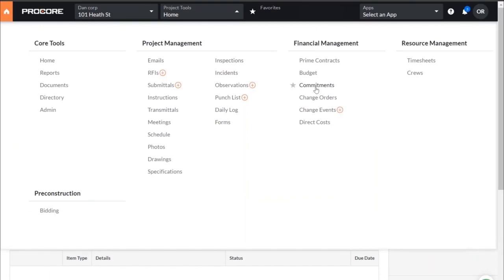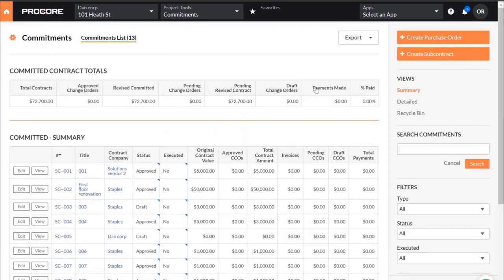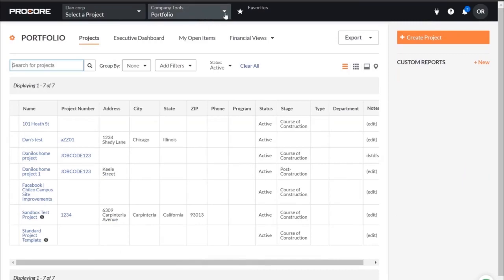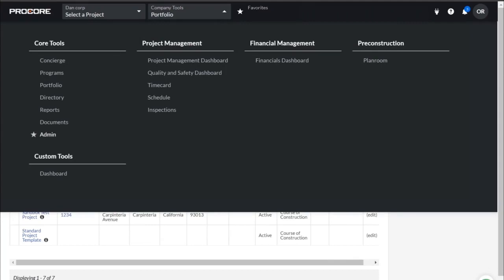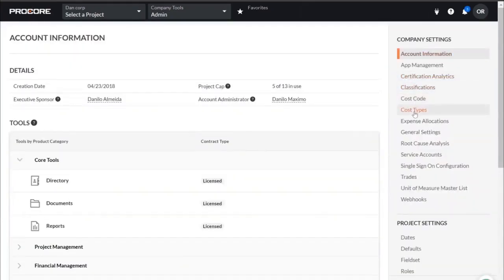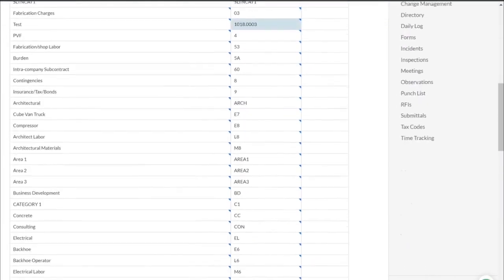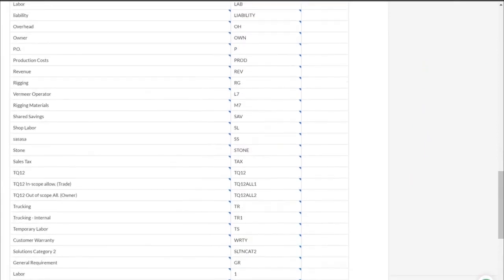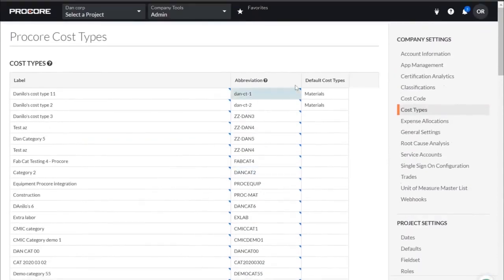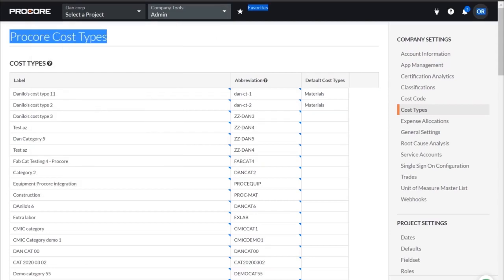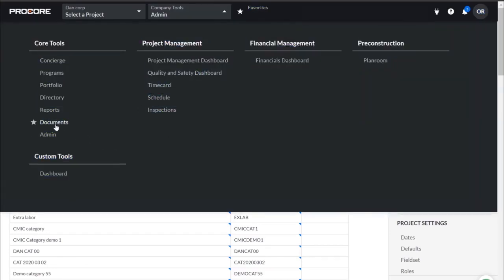I want to drill down into the Procore application and show what's happening from the subcontract perspective. Coming over to the admin screen, I want to bring your attention to these cost types. All of these cost types within this scope came from a CMIC project. You have the ability to take any one of these cost types and pull them down into your project along with the cost codes, to create that perfect match in order to get your commitments established in CMIC when you broadcast it.